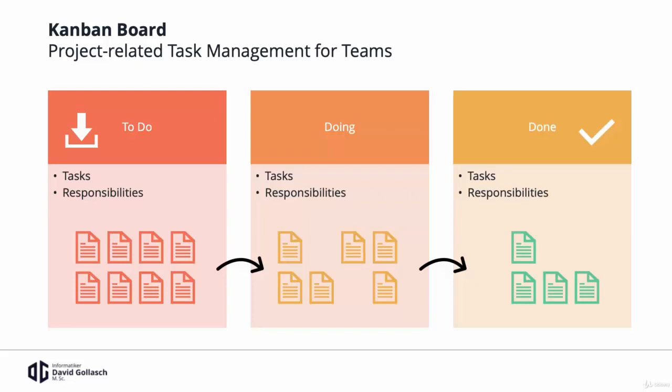And if your card with a task on it is fulfilled, well, then you move it over to the done column here. So you maintain the 3 basic states: to do, in progress or doing, and done. This is the simplest way. At the beginning of a project, everything that you plan to do will be put in the to-do column. And if the project is ready, then everything is in done, or you put everything through doing to the done column.